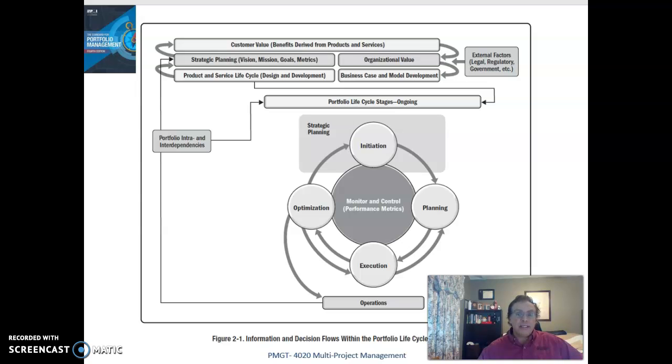Most projects were failing. They were not on time or were over budget, and those that did complete had low customer satisfaction. Then we implemented governance and portfolio project management using Excel. That lasted for about 2 years, but it allowed us to focus down to 40 projects at any given time. We had more projects that were done on time, under or on budget, and we increased our customer satisfaction.